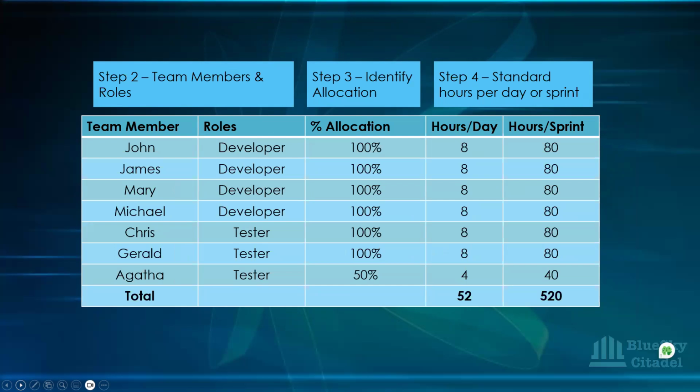Now I'm going to explain something. You will look at the chart, the table that we have. There is no BA there. There is no business analyst. There is only developer and tester because these are the people that are actually carrying out work. BAs are wonderful because even the developers and the tester won't be able to do what they need to do without the requirement. But the BAs work ahead of the sprint. So if we're carrying out work for sprint one, the BAs have already finished their own work for sprint one. That's why we have a story to commit to sprint. So in sprint one, the BAs are doing the work for sprint two. That's why we say they work ahead of the sprint.